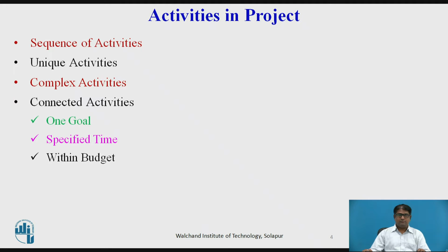To determine the sequence, it is helpful to think in terms of inputs and outputs because the output of one activity or set of activities becomes the input to another activity or set of activities.